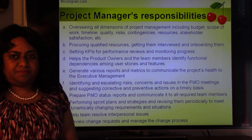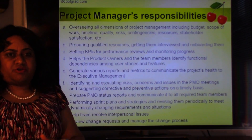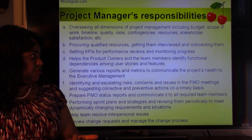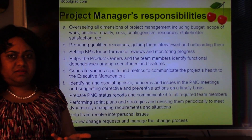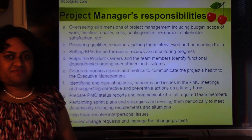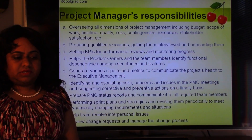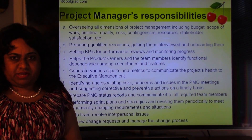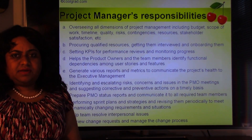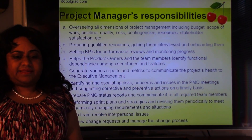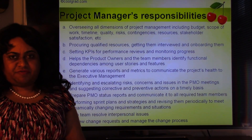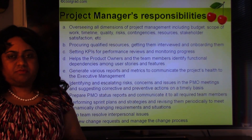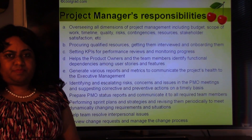A project manager is different from a product owner — the product owner is more from the business team. The project manager manages multiple dimensions of a project including budget, scope of work, timeline, quality, risks, contingencies, resources, and stakeholder satisfaction. Usually the client has an in-house project manager or one from the system integrator. The project manager manages the budget, prepares Gantt charts using MS Project, identifies functional dependencies, determines billing rates for resources, and prepares the project proposal. They get it approved by the client, obtain business requirements documents (BRD), analyze the BRD, and prepare a statement of work laying out the scope with minimal ambiguity.